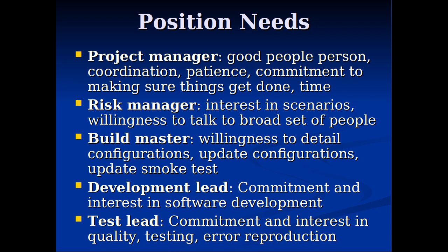And it's a feeling that can be averted by appropriately putting in place plans earlier, or mitigation. So, for example, you do a thorough evaluation of how well these technologies play together across a variety of ways. Or you have a backup person that you can call when the dev lead is gone. You have someone else who knows the code base who can step in for a lot of that, instead of the dev lead being the only person who knows the code base, etc. So shadowing people, spreading knowledge via tutorials, spreading knowledge via pair programming, or via inspections and peer review, these are all good ways to avoid that. Okay, so risk manager is really important.